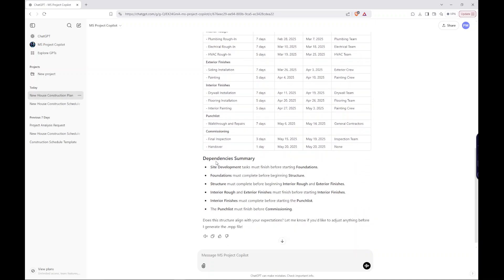So dependencies summary. Site development task must finish before starting foundations. Foundations must complete before beginning the structure. Structure must complete before beginning interior rough and exterior finishes. So it's made really good logical sequences. Does this structure align with your expectations?